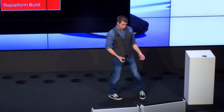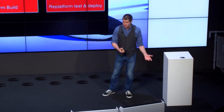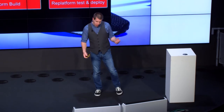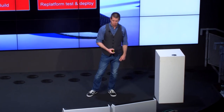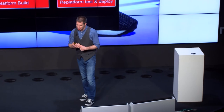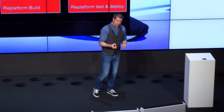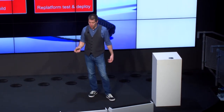Then December 2016, we were building that and then testing it. It took ages. We totally underestimated the time to do this replatform. And in that time, the business expected us to have a redesign. Other things we were doing, we moved the full site to HTTPS. I wanted to do that as soon as we came out with the new platform work. And this is genuinely a thank you to Google for all those carrots and sticks for getting us to move to HTTPS, like the removal of the geolocation lookup on Chrome and different things, because I was really committed to that. I think it's great for consumer security and trust, and we know why we need to move to HTTPS.